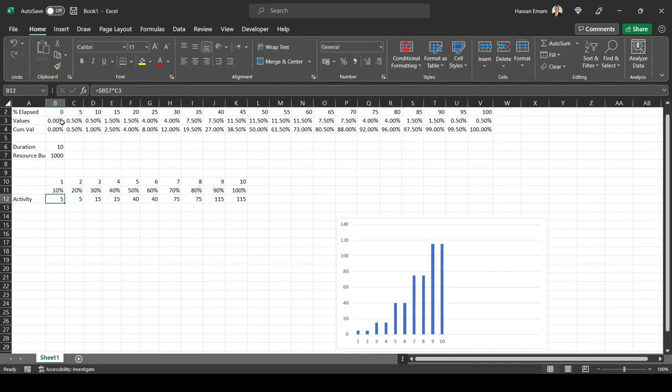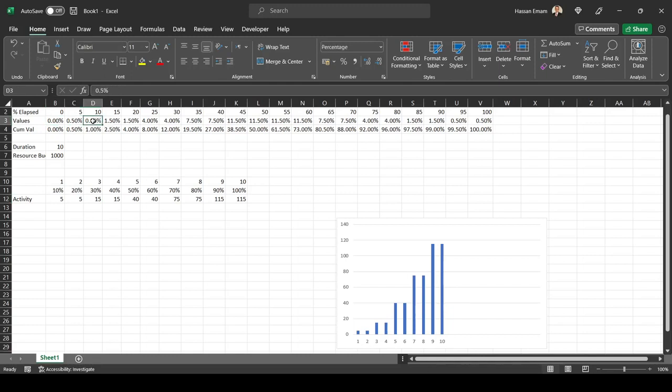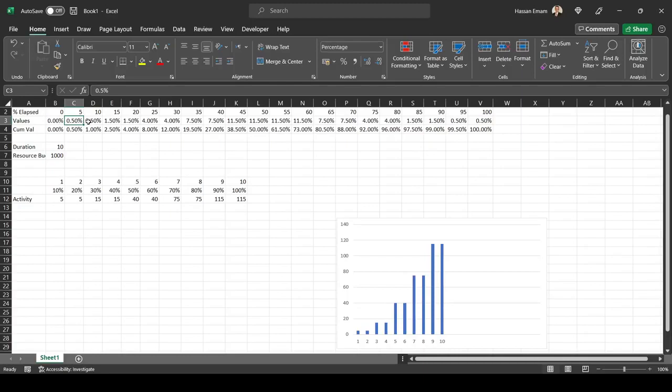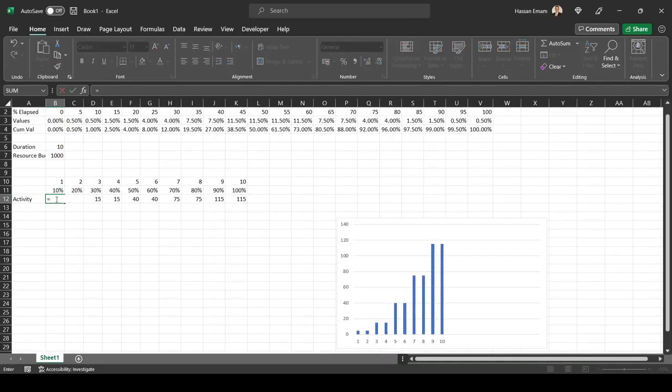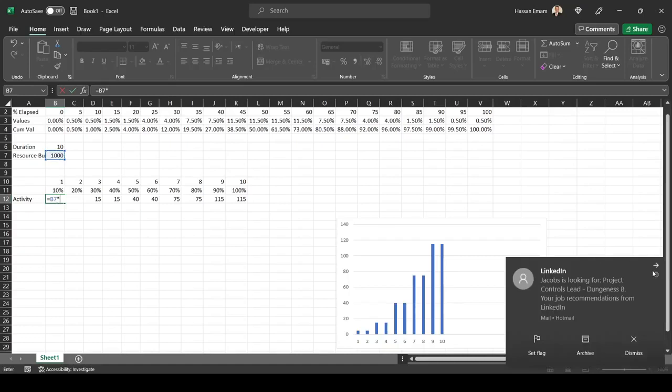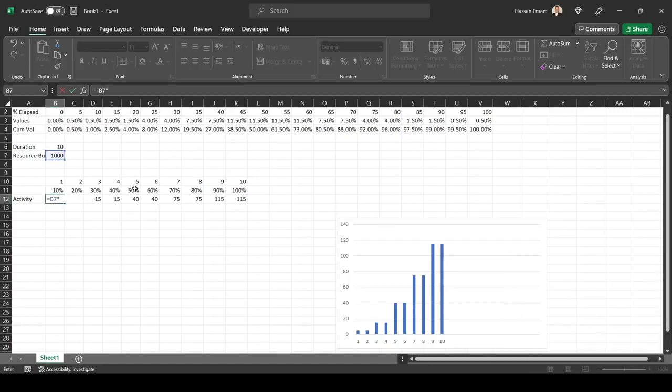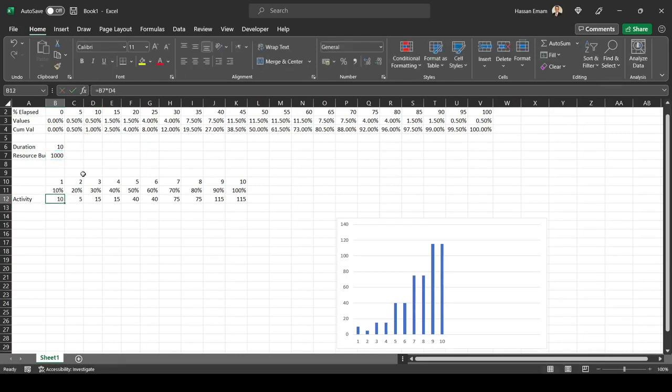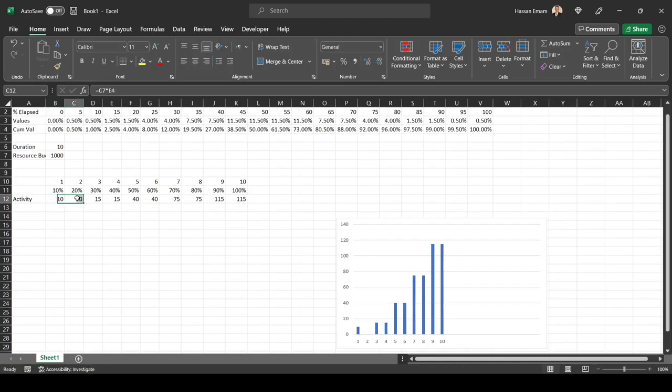What we need to do is to look at not only the 10 corresponding value, because the 10 corresponding value is 0.5, but we had 0.5 in the five percent, so these two are included within that period. The way that I'd like to do it is to calculate that. I would say that it's 10, so multiply the 100 percent, the thousand units, by the cumulative value, not the value.